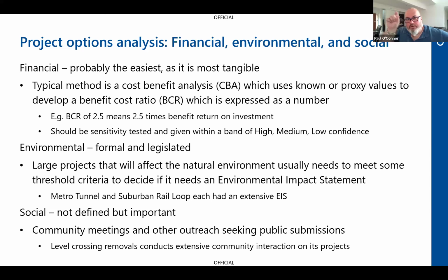So there's a whole lot of values you can put together to actually work out the value of the current state. And then you can develop, based on what you think you need to achieve, you can then sort of forecast what a likely outcome might be in terms of smooth flowing traffic and how many savings there would be. So use those values to go into quite a complex economic model.